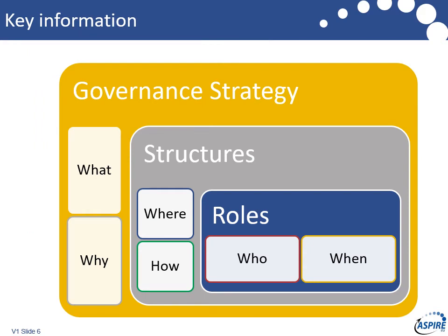As you build your governance model, you need to think about the structure of the information that you're gathering. So what you're really looking to get is a governance strategy that sets out how your project and program fits with the rest of the world. If you're part of a portfolio, then you'll be inheriting a number of standards and processes and working practices. If you're in a standalone mode, then you might have to create these, and these will have to cover a whole range of areas around control and benefits and risk, about how you're actually going to manage yourself, how you're going to align to your organizational policies, for example, standard systems, like maybe you have to use for HR. So you need to recognize them, else you'll catch a cold at a later date.